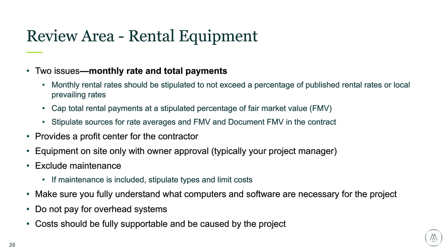Maybe the bigger items, you could probably apply the 80-20 rule to get most of the potential exposures out, but making sure that you have a good understanding of what equipment's on site and why it's needed and when it's needed. Rental charges should exclude maintenance. We often see that they'll charge you full market rate, and then you'll pay for, let's say, a transmission change on a truck. So that's duplicate in nature, so having good contract terms around this will prevent you from overcharges.